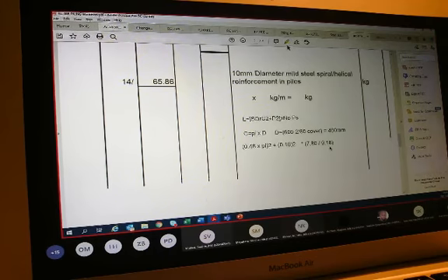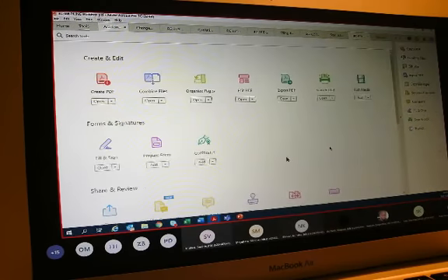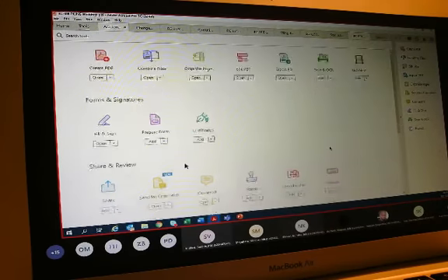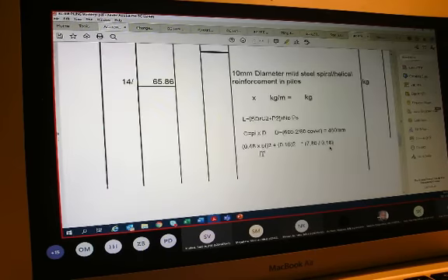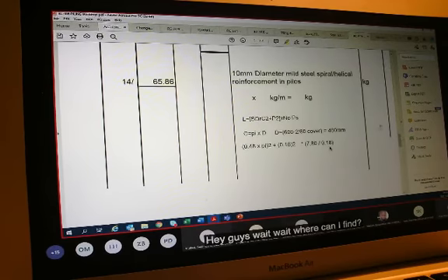How many p's do we have? I will then have to say 7.80 divided by 0.18, because that will give me the number of p's. Where is my highlighter now that I need it?